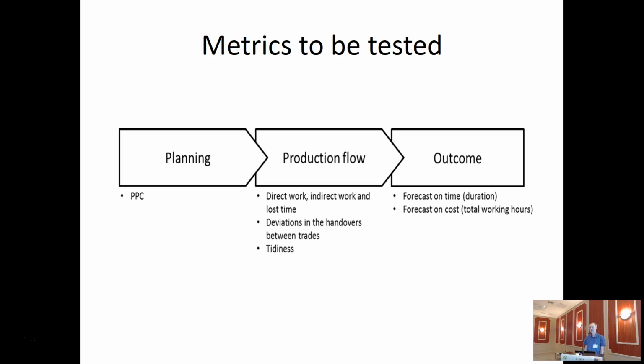Why are root causes not one of the metrics you're concerned with? We're actually discussing that in the paper, and the reason is that root causes are multi-dimensional. So what we think is that they should use the dashboard to discuss root causes, but the root causes cannot be on the dashboard. That's how we look upon it. But one of the important uses of the dashboard is to discuss root causes for why some of these metrics are not going the way they should. So I would suggest from our experience that root causes be visible very close to the PPC metric.